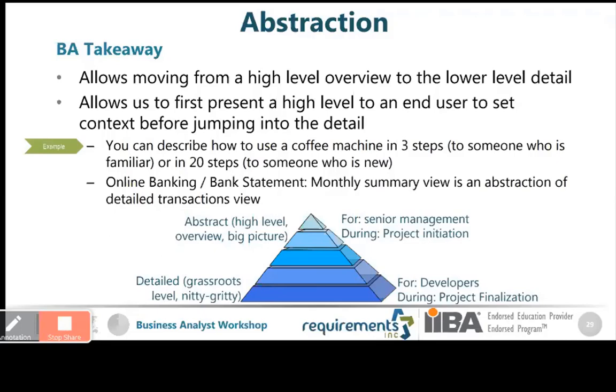It's also important to capture the requirements at every level. For example, you would have high-level requirements which talk about high level, what do you want to do? Gradually delving into the detail level. So for a high-level requirement, before even you get into a high-level requirement, there are different documents that we produce. So once you know about a feature, you write a vision document or a feature document or a proposal, whatever, different companies call it differently. But to me, I think about that as a 2-pager. Okay, any project, no matter how complex it is, you could potentially write up a 2-page overview about it for the VP.